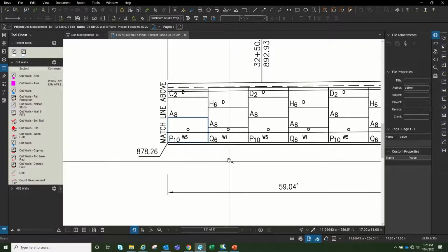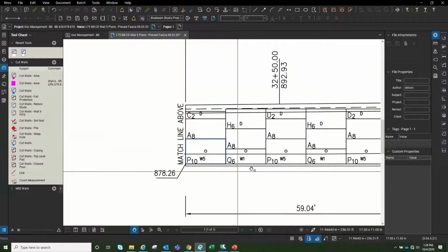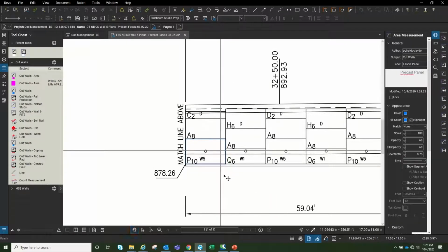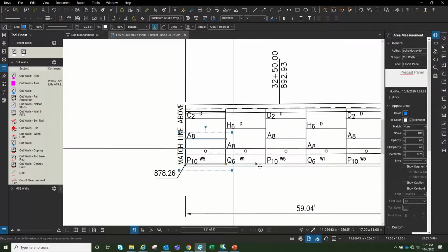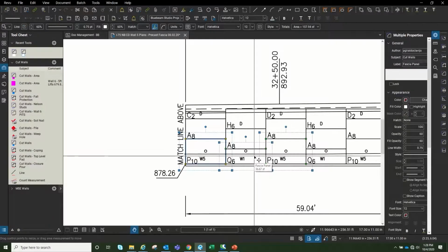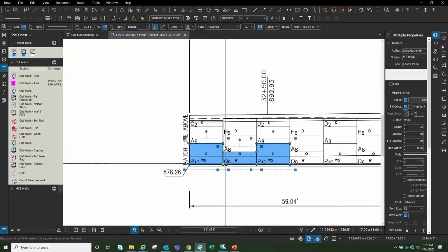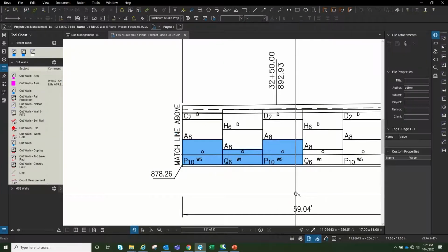So after reaching out to the vendor that's providing the precast panels, let's say we order all these 3 panels, these 3 bottom panels. I'm going to right click and set a status, precast panels as order. And now the panels are going to turn blue, right?